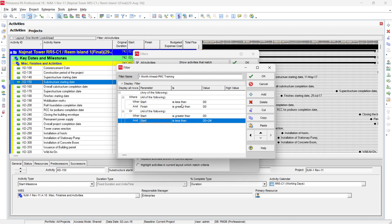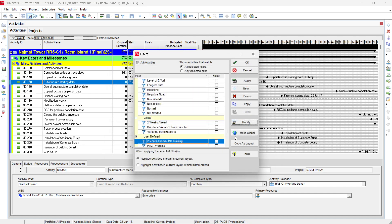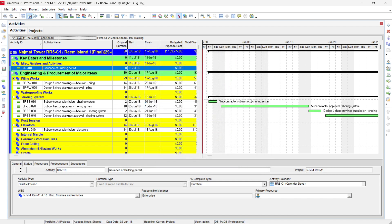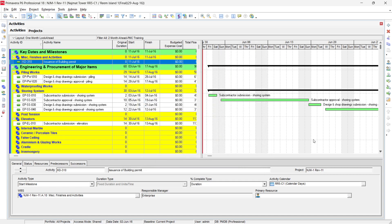For the look-ahead filter, set the conditions so that Start is less than data date and Finish is greater than data date — these two conditions ensure in-progress activities are included. Also add that Start is less than data date plus two months for a two-month look-ahead. Change the filter name to 'Two Months Look Ahead,' click OK, select this filter, and click Apply. The Gantt chart now shows your two-month look-ahead.